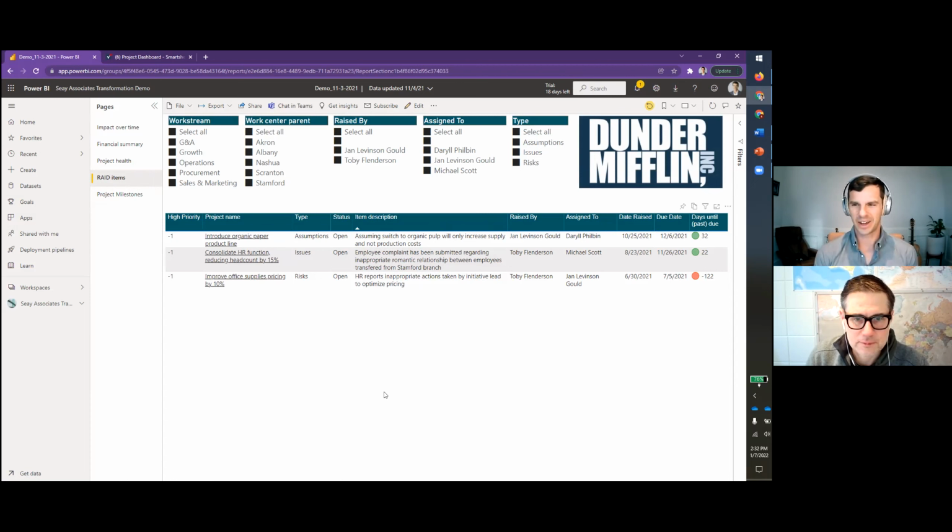We didn't have to extend the acronym too much, but the purpose behind this is, at the beginning of every project, you can have a product plan, right, or milestones to kind of catalog how a project is progressing. As you go, however, there will be decisions, there will be unstructured work that arises as the project is executed. And that's the role of the RAID log, to capture those items and then bring visibility to them so that people know what decisions, issues, or risks lay out there, and they can address them to ensure that the project is successful.